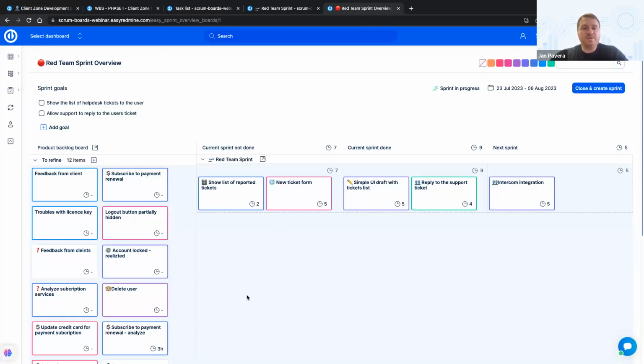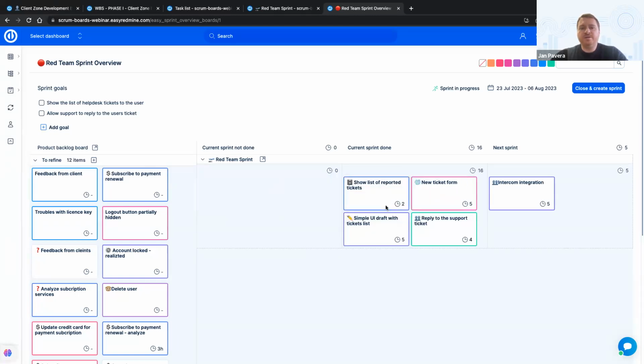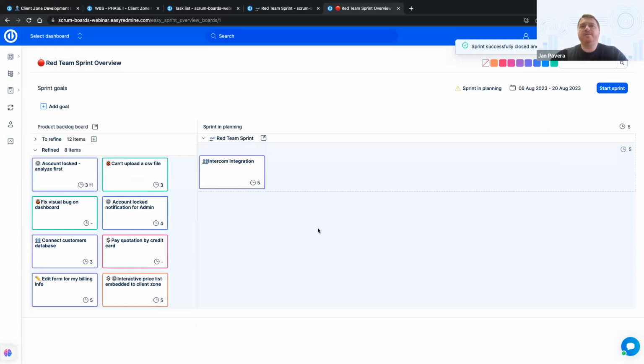So this allows the teams to be flexible and react to the client's needs, which is important for the agile way of development. So in the end, the team can move backlog items to done together with the client if they are satisfied with their work and accomplished goals, and here close the sprint and prepare it for the next sprint planning.